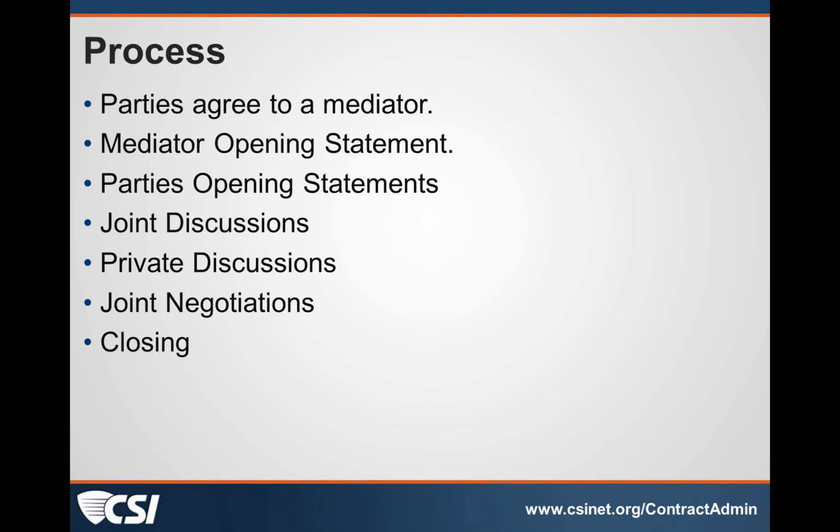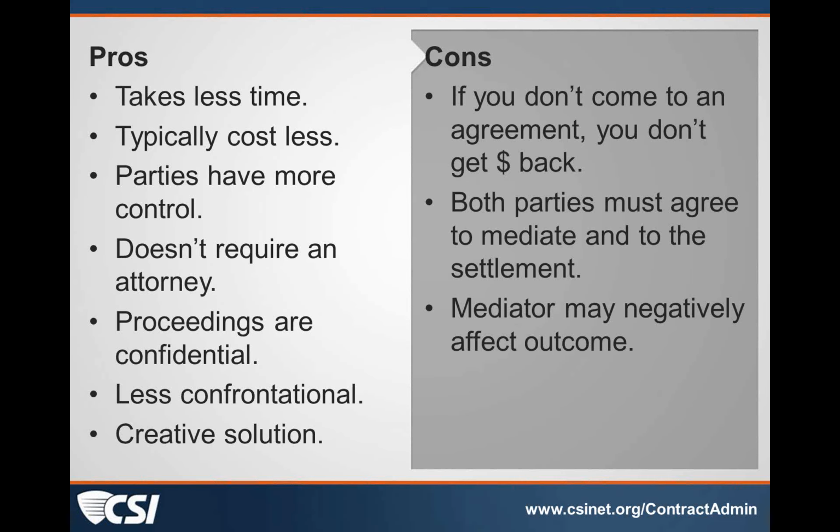Some of the pros and cons. Mediation typically is less time consuming. The parties can get together. You don't have to worry too much about outside schedules. You just have your 2 parties in dispute and the mediator to deal with. Typically it costs less. The parties typically will split the cost, share the cost of the expenses of the mediator. Parties have more control in the process.